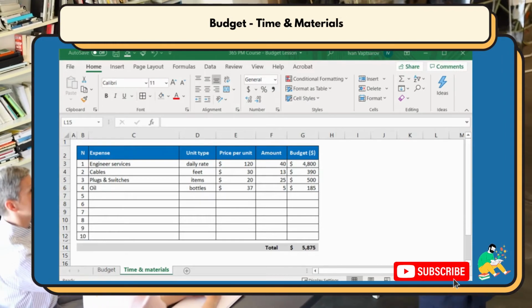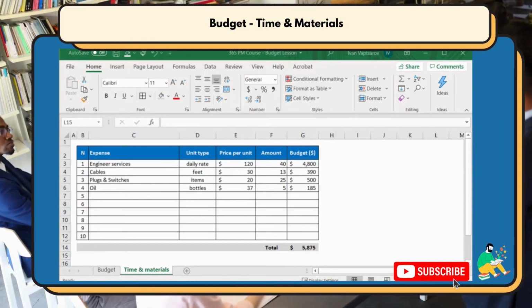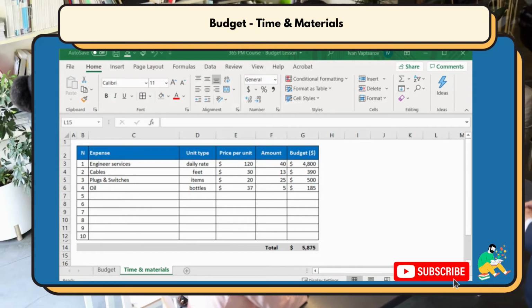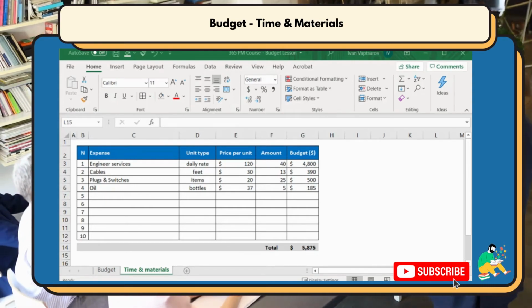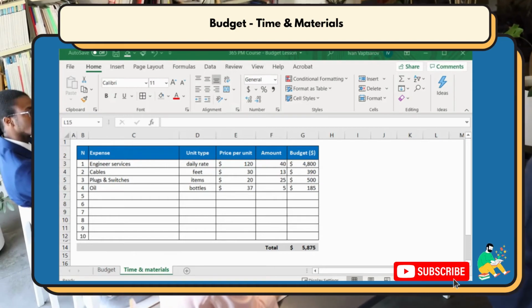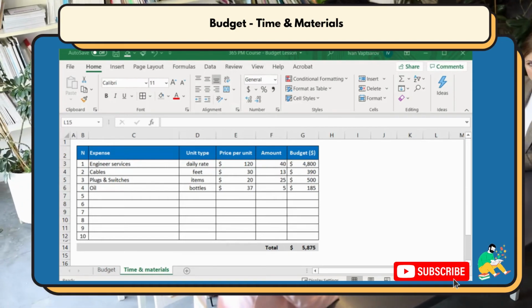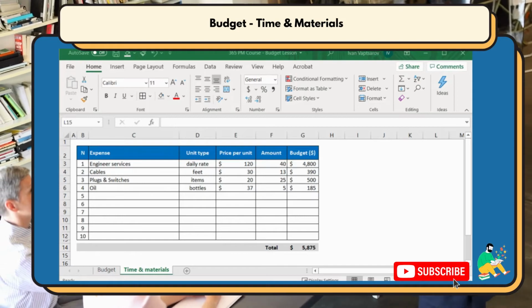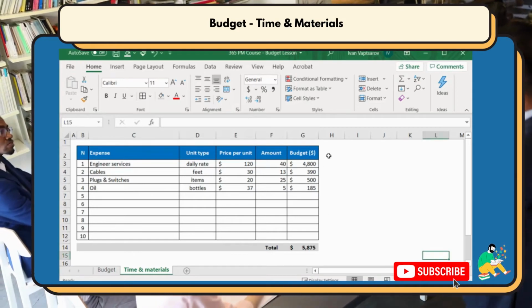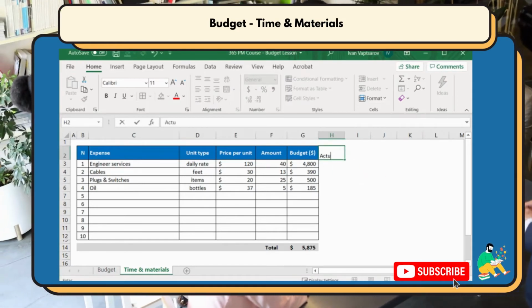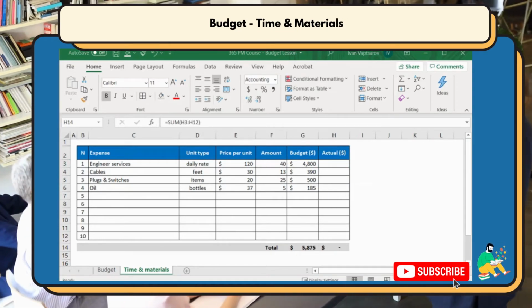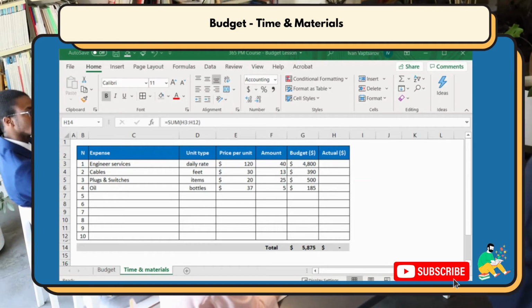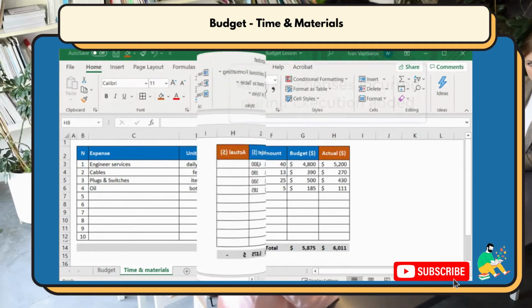As you know, budgeting is done during planning, but when the project moves to execution, the expenses start occurring. In order to transform your budget table for monitoring and control purposes, you will need a dedicated column. And yes, it is for the actual costs. Here you will be adding all expenses that are made for your project. Formatting is the same, but if you like, you can just add a different color to put the focus here.